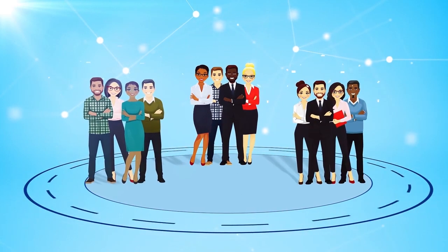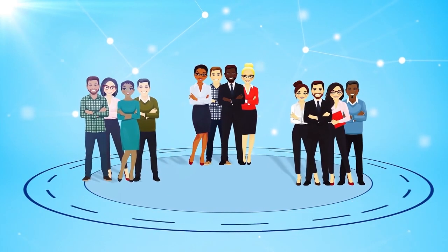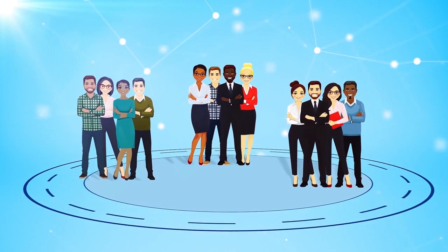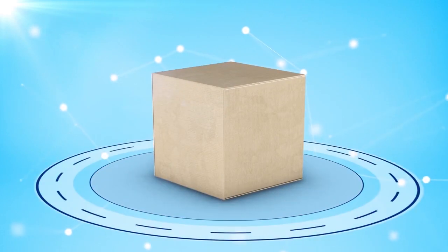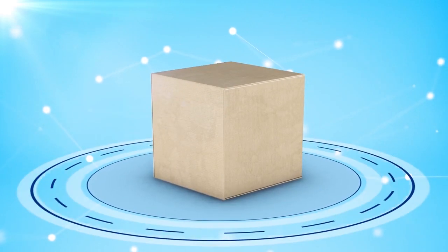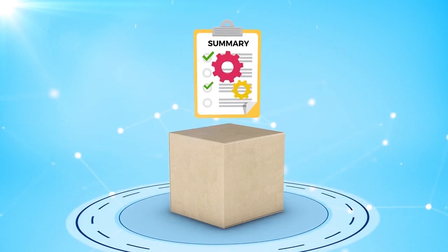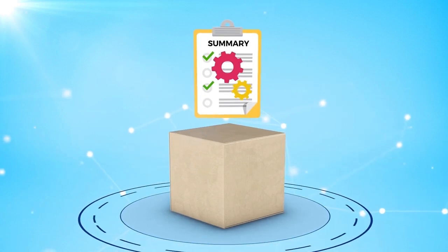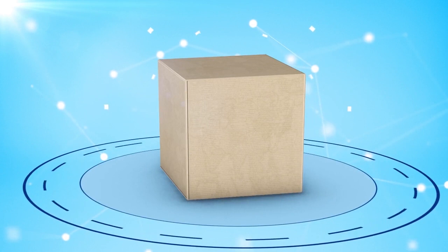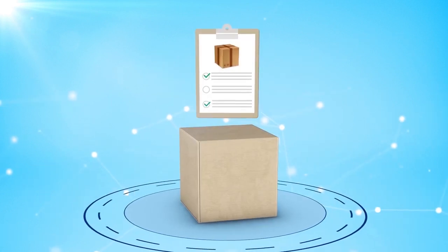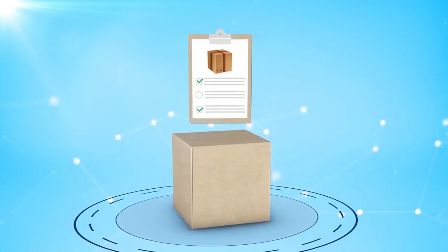A product vision box is sample packaging that visually describes the product. Stakeholders are divided into cross-functional groups of 4 to 6 individuals who design a product vision box. For the front of the box, you think of a product name, a relevant graphic, and bullet points summarizing the key benefits that the product can provide. For the back of the box, you provide a detailed product description and product requirements.